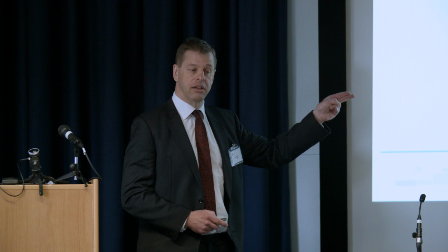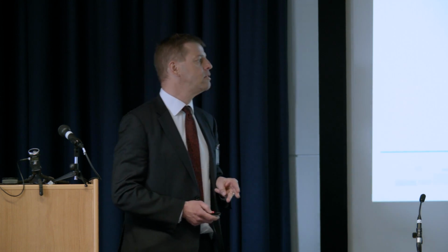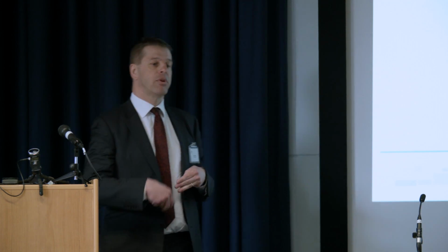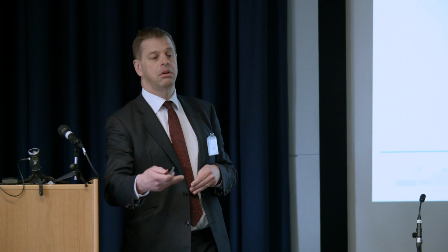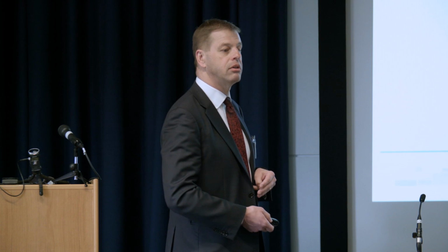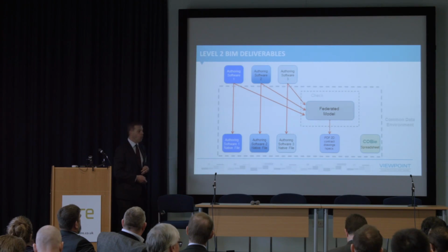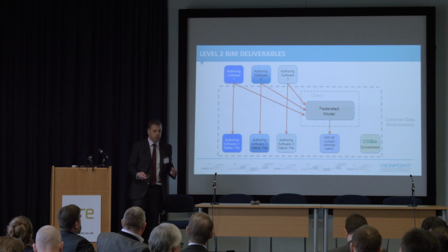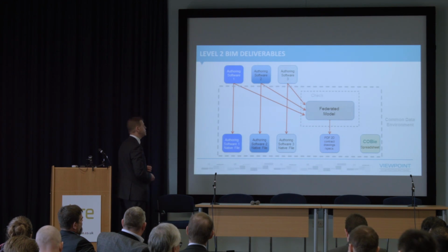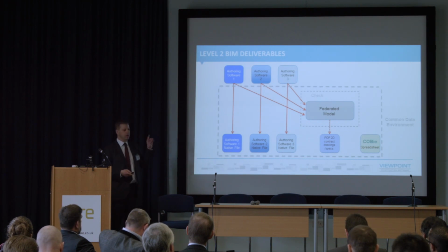You've got the bit that's different. We've now got data. So asset data at the moment in the form of COBie. And at the completion of each deliverable, we're told that we must upload native files to define that deliverable. And all of this must sit within, we're told, a common data environment to allow that collaboration to take place. So that's what we're supposed to be doing.